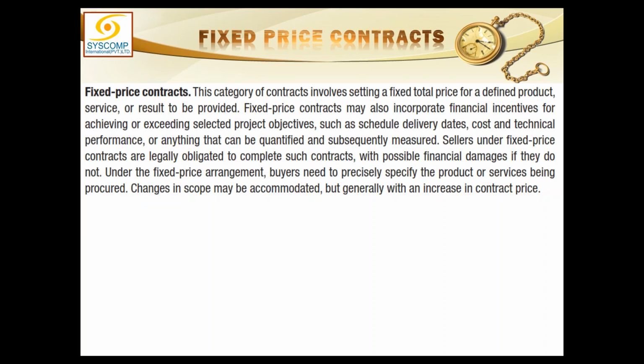Now if I say that I want to change the scope, or I want to change the design or anything within the project, the contractor will quote the contract and would say that this is not given in the contract, and if at all you need to add this requirement, that requirement would cost you extra, and now you are bound with this contractor, and this contractor is going to make you pay for the changes again through your nose.